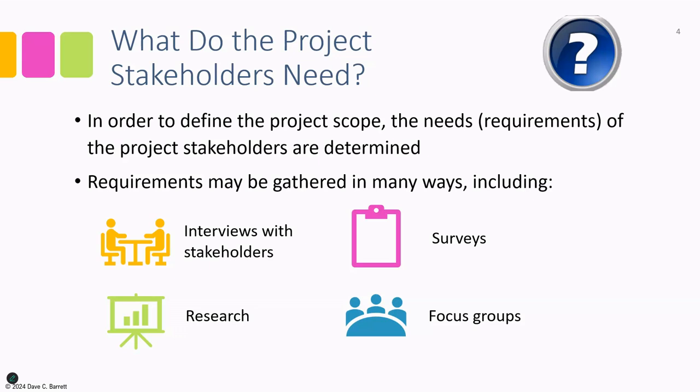There are a number of methods that may be used to gather requirements in the form of interviews, that is, meetings, either individually with stakeholders or group meetings, and so on, whatever is practical. Interviews with stakeholders are generally done when there is a finite number of stakeholders and that's feasible.